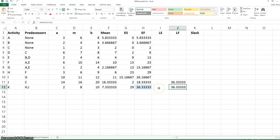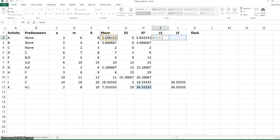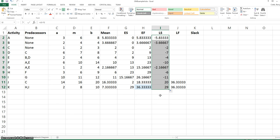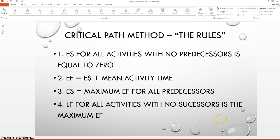The latest start time for each activity is the latest finish time minus the mean activity time. This formula will be the same for each activity, so we can set the formula up in the second row and then copy it down to the other rows, except for the last two rows. The fifth rule is that the late start time is equal to the latest finish time minus the mean activity time.